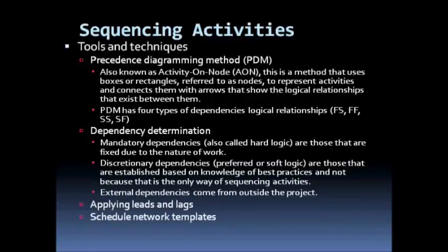In sequencing activities also, we could take into consideration the ability to apply leads and lags. Applying leads here will mean starting an activity earlier than planned. Now applying a lag will mean delaying an activity. Then we could make use of network templates, already created templates which will serve as tools for us to customize for use on our current project.